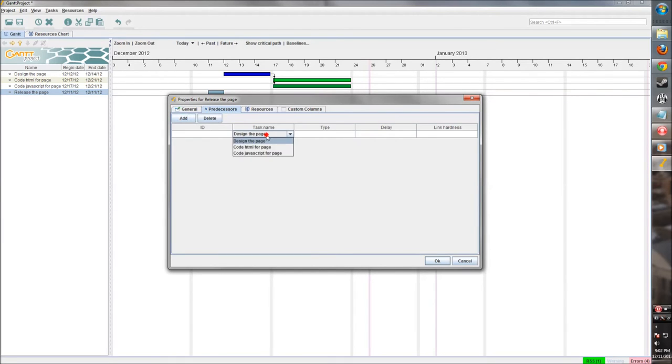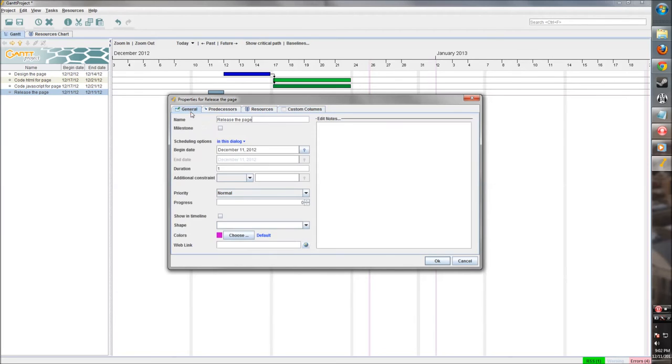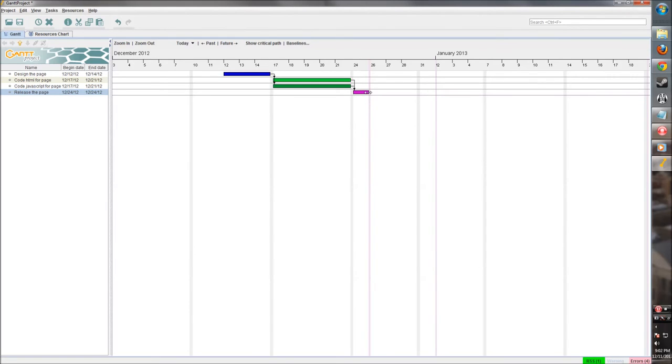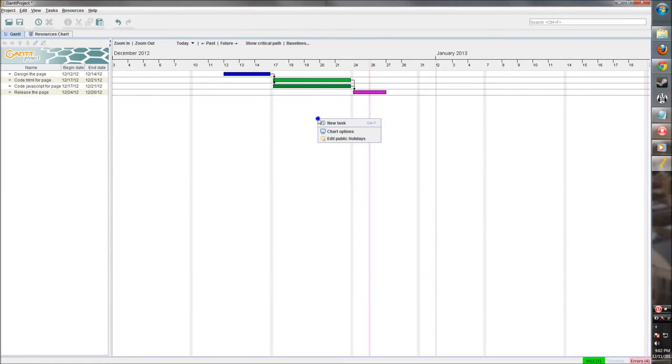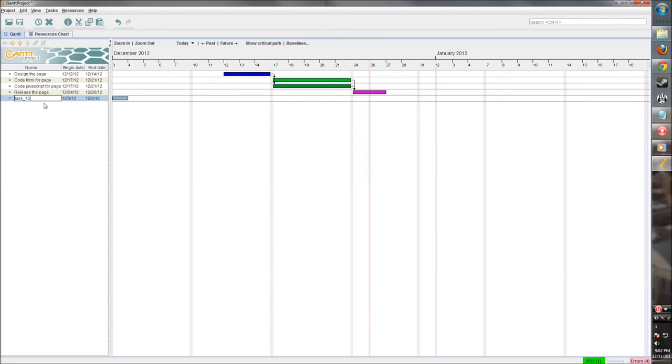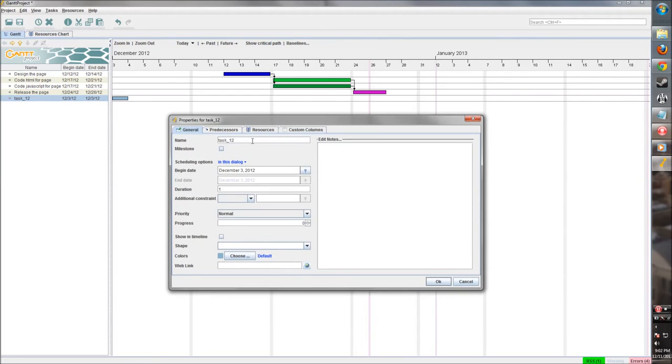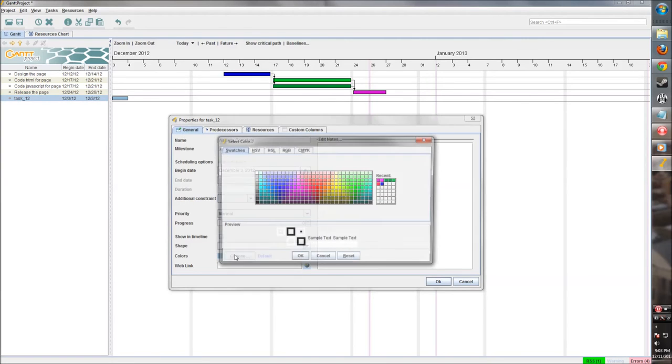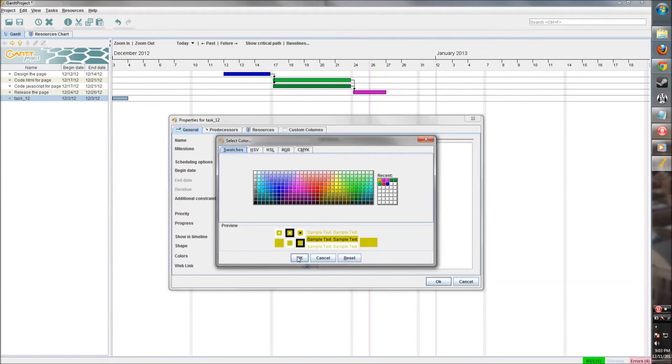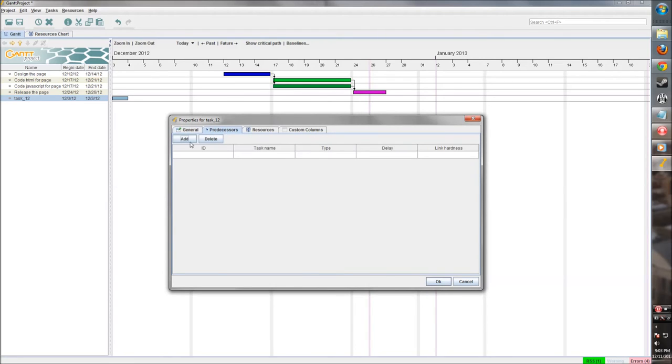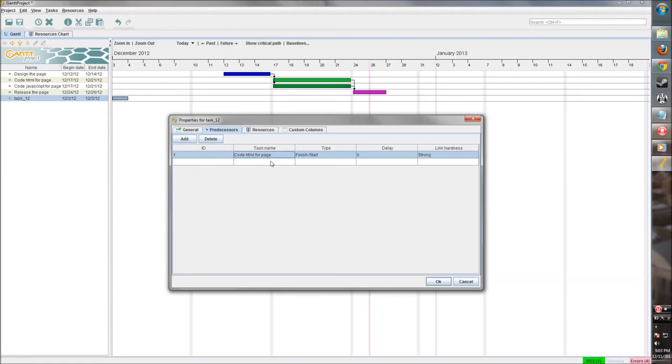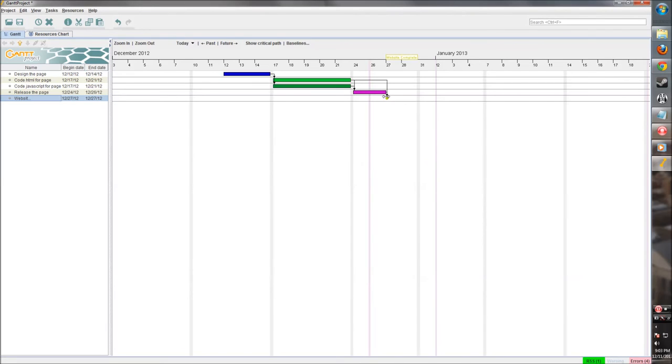Let's say that takes just as long as coding HTML. Now releasing the page - let's make that a different color. And this needs to be after all of the coding is done. That takes a couple days to get it deployed. Now once this is all complete, that means the project's complete. So let's make a milestone that we can work towards to encompass all that work. Let's say this is website complete - this is what we're working towards. That's going to be a milestone. Let's make that gold like a gold medal - that's what we're running towards. And this needs to be done after the release. So there we are, that's our milestone that we're working towards.